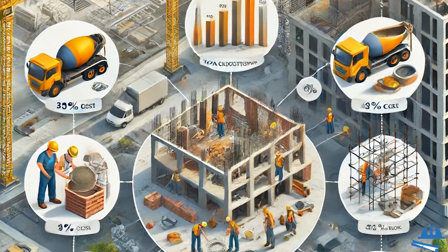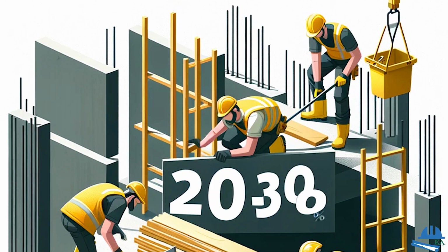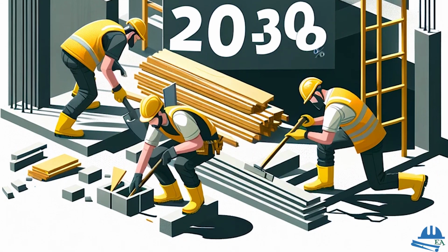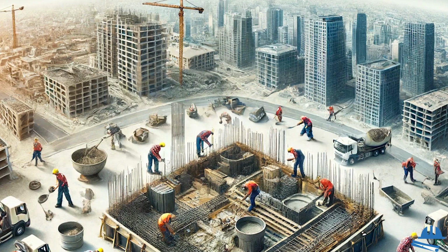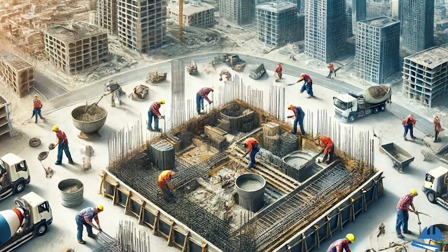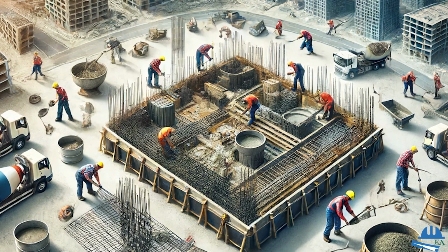So finally, now let's talk about the labor cost. So labor costs are a significant part of the budget, accounting for 20 to 30% of the total construction cost. This can vary based on the region and the complexity of the project. So for example, if you're working within a state or within a country, then within that country also, the labor cost can vary.